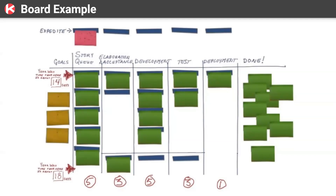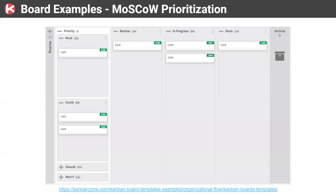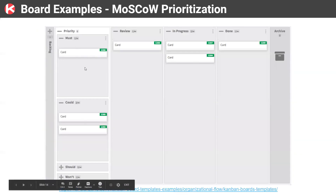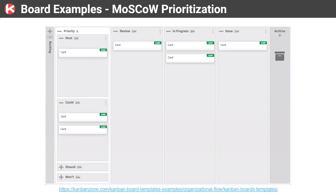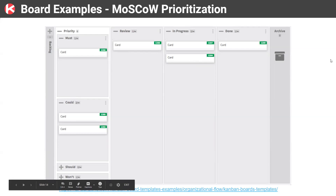This team has decided to have a board with a separate lane called an expedite lane. A board doesn't have to be a simple table or box — it can have separate lanes, multiple lanes, columns, and rows. It can look however you want as long as you can still enforce WIP limits. Here's another example: a Kanban board with multiple rows in only a single column — the priority column — using the MoSCoW technique to visualize which cards are must, could, should, and won't, and then they flow on the board.